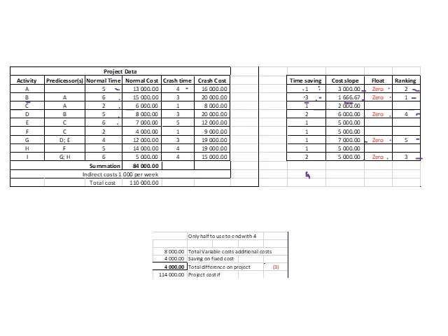Okay, so basically what we've calculated now is that we're reducing our project time by 4 weeks. We've got 1 week where we're going to have an additional cost of 3,000 Rand that we have to add to the project, and we're going to have 3 times 166.67 to be added to our project, and that is calculated at our variable costs at 8,000 Rand.